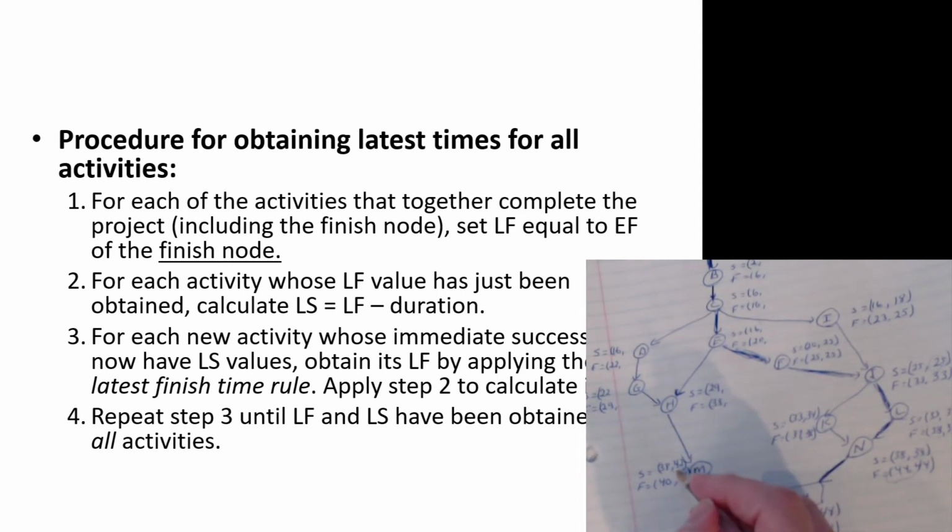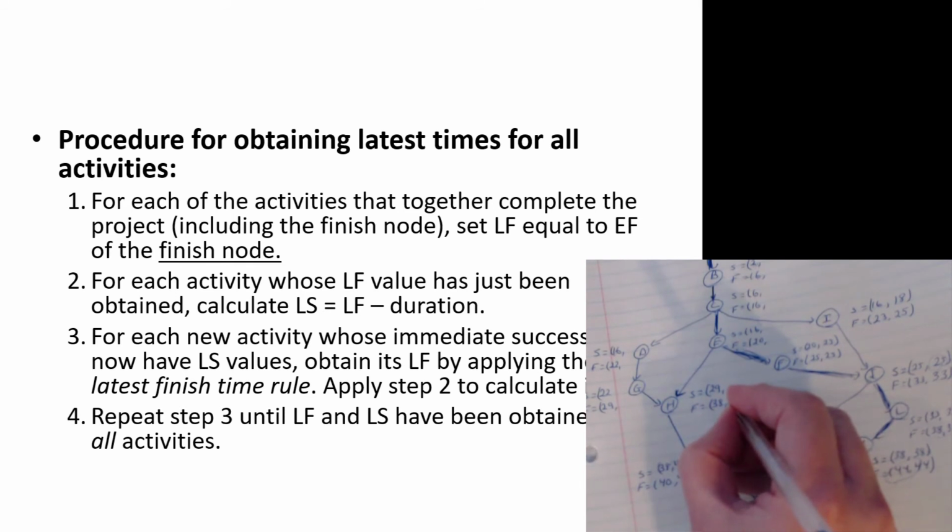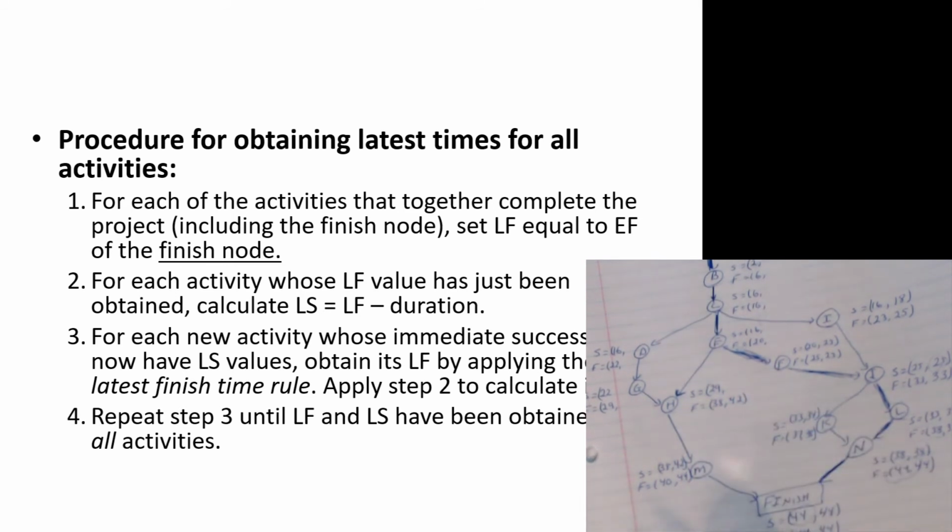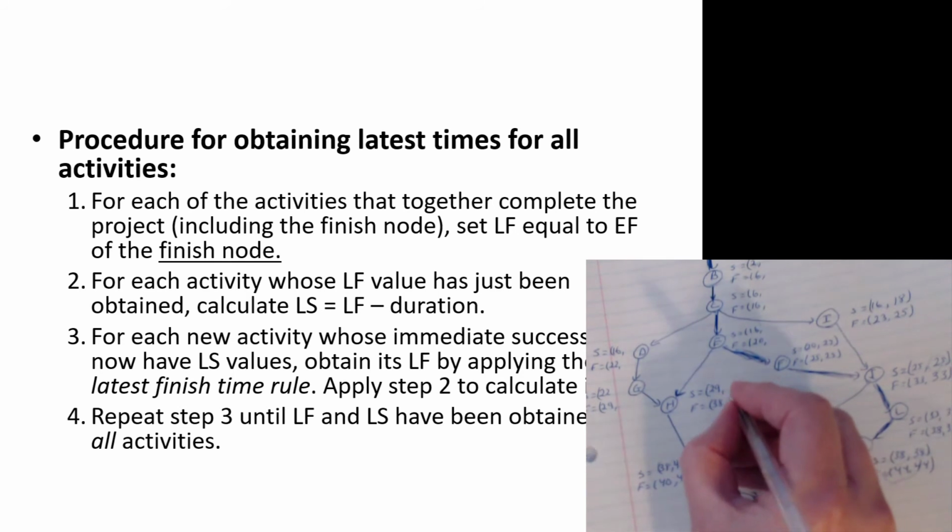H must finish by no later than week 42. So its latest finish time is week 42. And take off how much H takes: 9 weeks. And so we get 33.